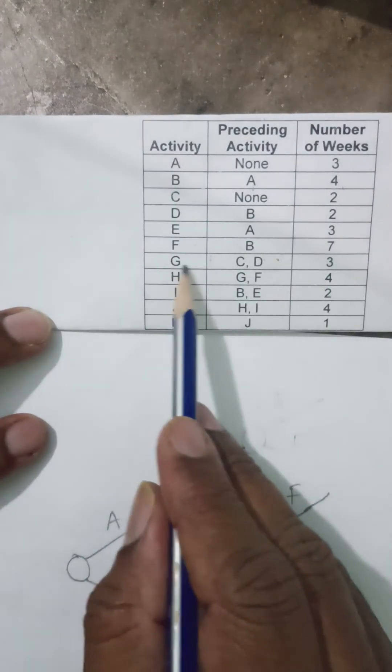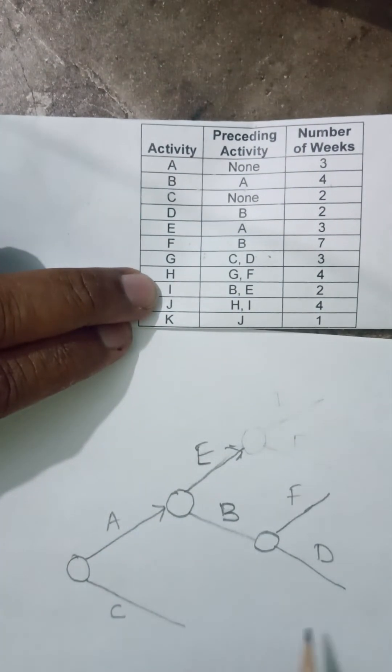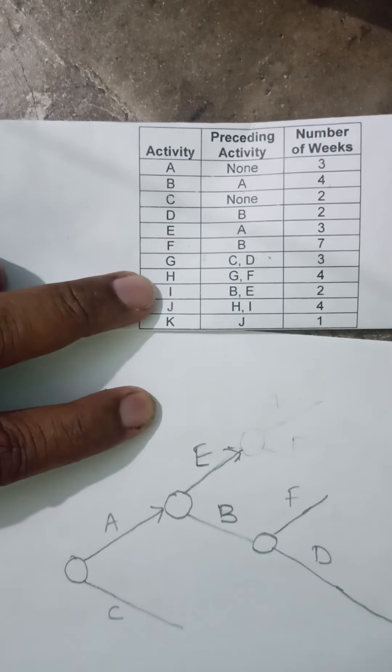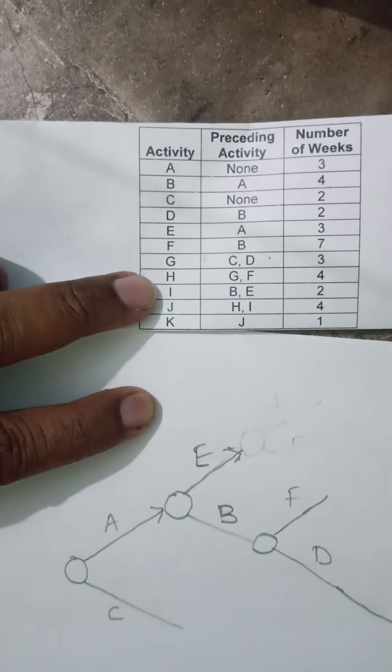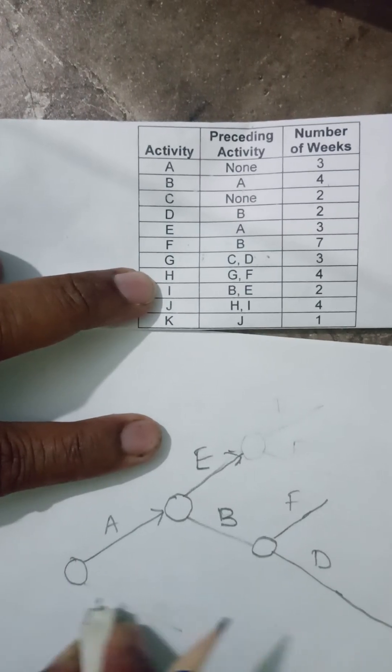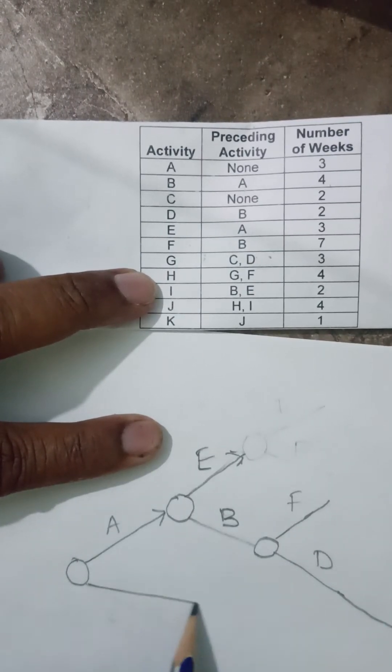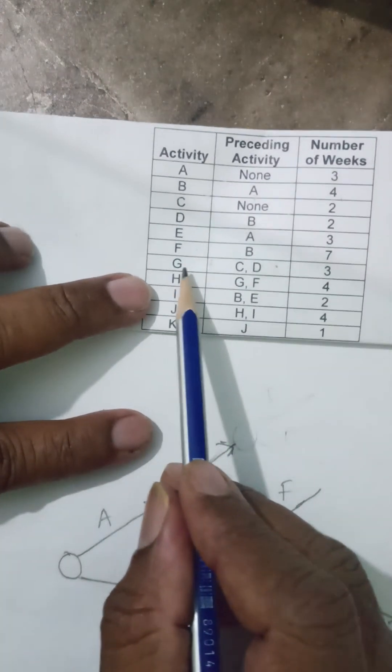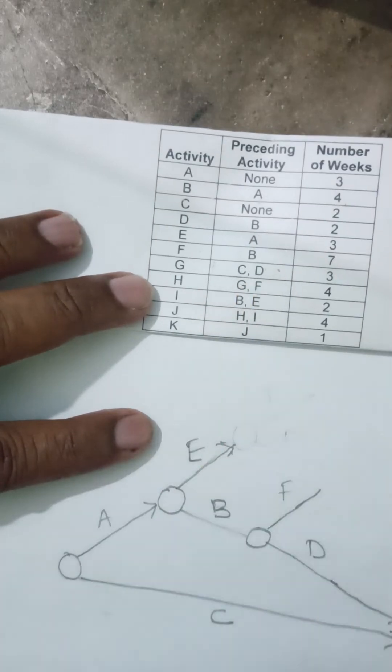G is starting from C and D. Somewhere C and D can come together. Maybe I will extend it further, and from there my G will start. I can just simply connect this. This is my C, this is my D, and my G is starting from here. G is starting from C and D.